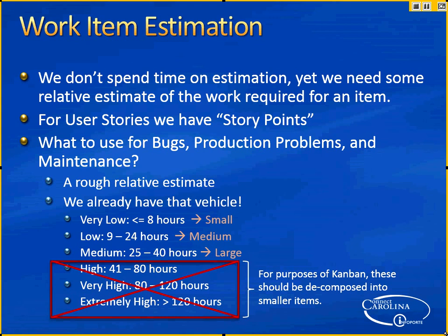You would do the effort to break it up into smaller pieces. You would get it into the backlog in the smaller pieces, go through the prioritization, and then pull the pieces. But you make sure that the relationships between certain pieces are clear: this and this are related. Even if it's one product, each piece could be a step at which it can be shown to someone.